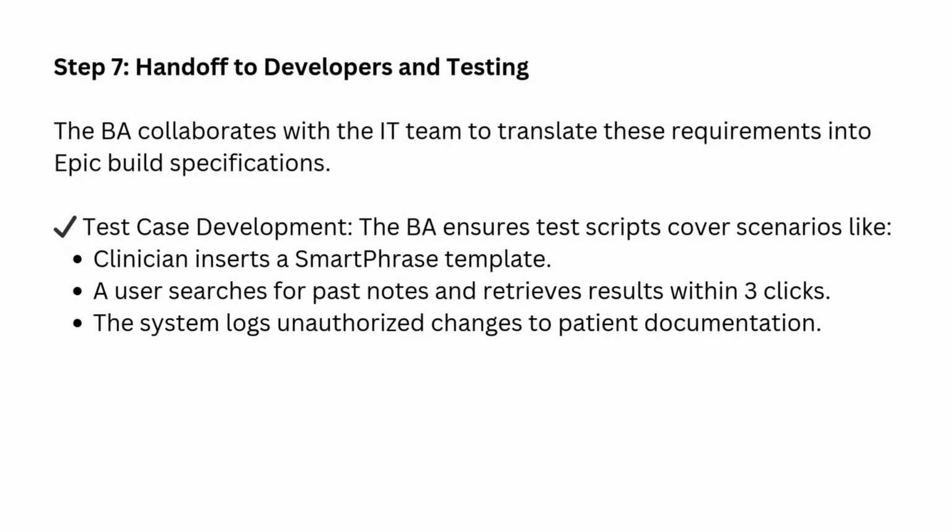We test everything. We test the functionality of SmartPhrases, making sure they can be inserted properly and that the text expands correctly. Oh, yeah. We test the search functionality, verifying that clinicians can find past patient notes within those specified 3 clicks. Right. We even test security features, making sure that unauthorized users can't access sensitive data. So you're trying to anticipate every possible way a user might interact with the system and make sure that it can handle it gracefully. Exactly. And remember, those test cases need to be clearly documented and executed in a systematic way. This is an essential step in ensuring a smooth and successful EHR implementation.